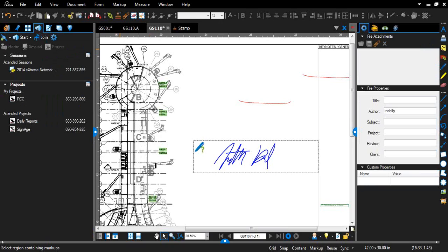A studio session is where you can have a document or a set of documents up in the cloud, essentially, where they are housed by Bluebeam, and you can then, in real time, have multiple different parties reviewing, marking up, and hopefully approving your shop drawings or your product data or things like that. So essentially what you do is you set up a studio session, you invite your architect, your engineers, maybe your subcontractors, and all of you can then review it at the same time without having to send emails and ruin everybody's email storage with tons of PDFs going back and forth. A lot of guys not getting their emails, not checking their emails. It really helps expedite the process.